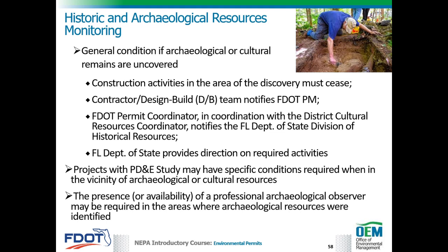Contractor or design build team notifies the FDOT project manager. The FDOT permit coordinator, in coordination with the District Cultural Resources Coordinator, notifies the Florida Department of State Division of Historical Resources, and the Florida Department of State provides direction on required activities.